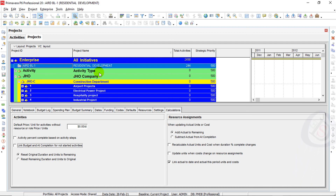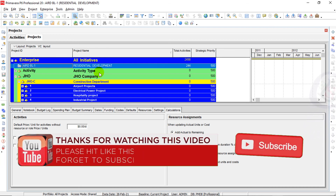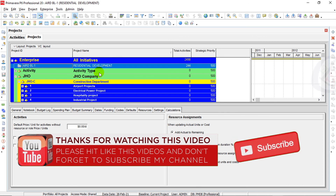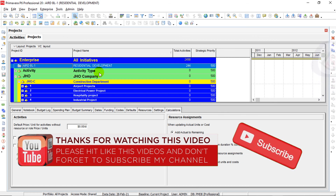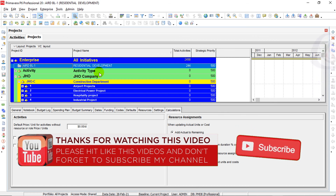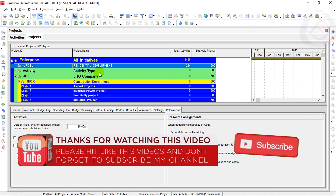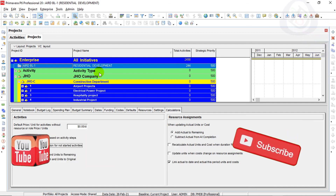My learners, if you have the same problem on your PC, you can apply this solution using SQLite Expert — delete from User Session and also Project Share. This allows you to delete the project and schedule in Primavera P6. If you like this video please press the Like button, comment if you have any problem, email us, and share this video with your friends, P6 learners, planners, schedulers, and project managers. Thanks for watching — see you next time.